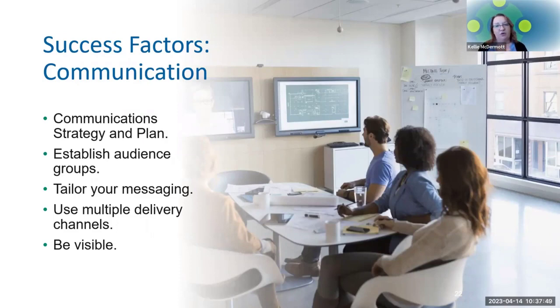So communication, of course, is important in all areas of an organization, project management, in your daily life, in your personal life, but also in organizational change management. As a change leader or a project leader, you need to have a communication strategy and plan. And this could be part of your overall project management plan. You can include organizational change management communications in your regular communication management plan as a project manager. Or this can be a whole separate initiative here.